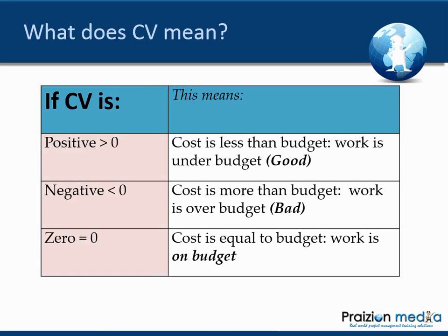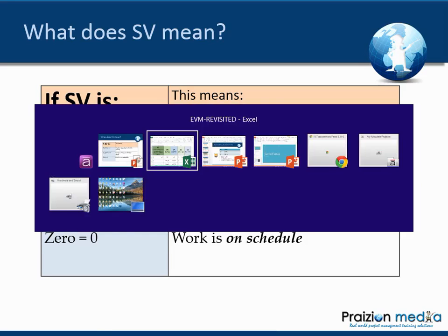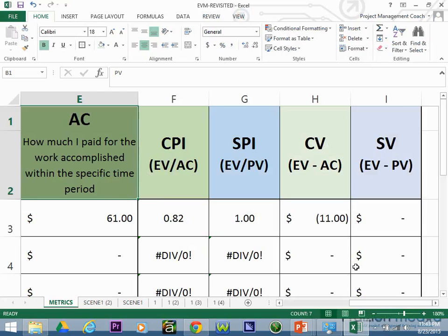For variances: greater than 0 is good, less than 0 is bad, equal to 0 means on target. Schedule variance greater than 0 is good, less than 0 is bad, equal to 0 means work is on schedule. We could go into more detail, but at a high level this helps us understand the first example on screen.